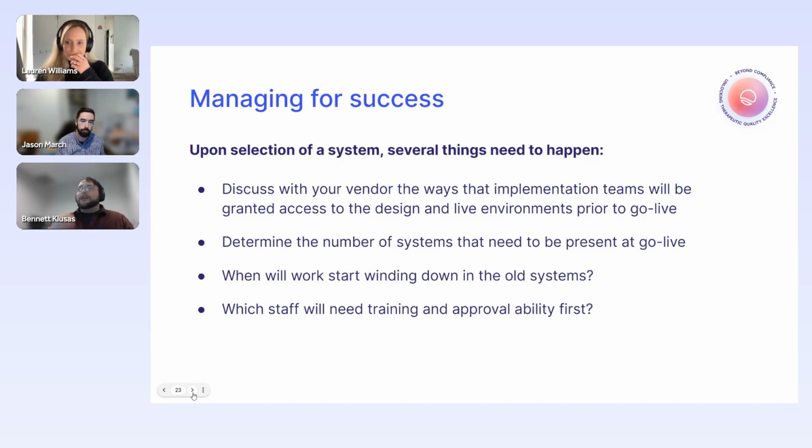You need to determine what needs to be present when you're going live to the rest of your end users at your company. And we're going to bring this up again. You need to start winding down those old systems, because you don't want to be managing two systems at once. So you need to ask some of these critical questions up front and think of the qualities, data integrity that you can improve upon as you enter this system.